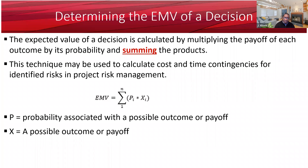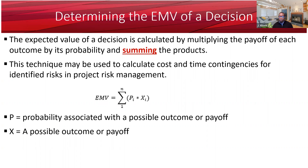The formula is the sum of P times X, where P is the probability associated with a possible outcome or payoff, and X is the possible outcome or payoff.